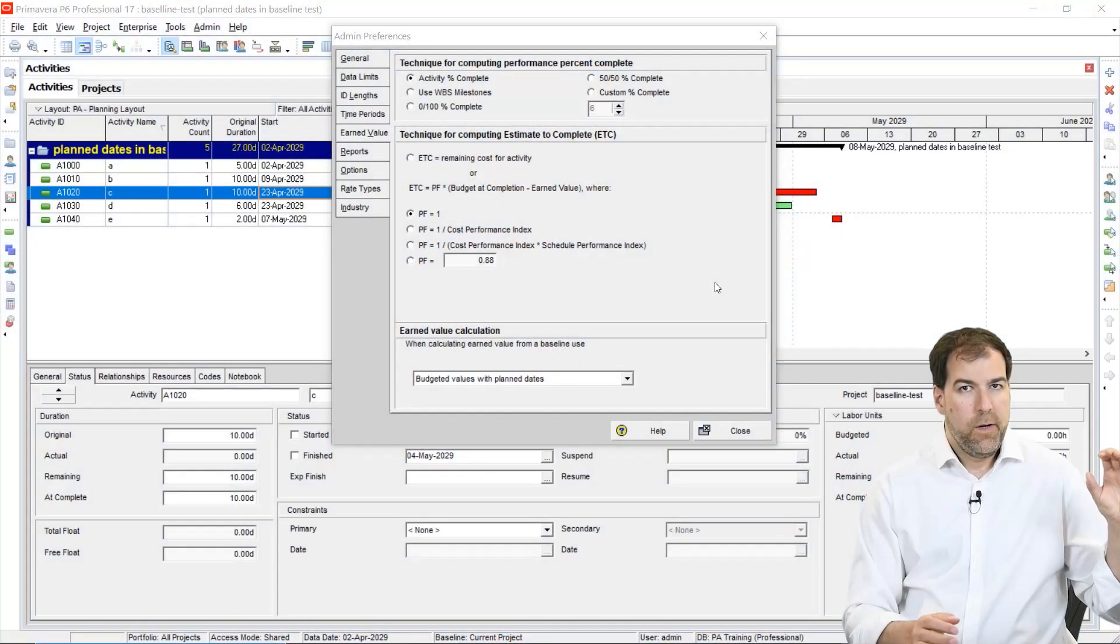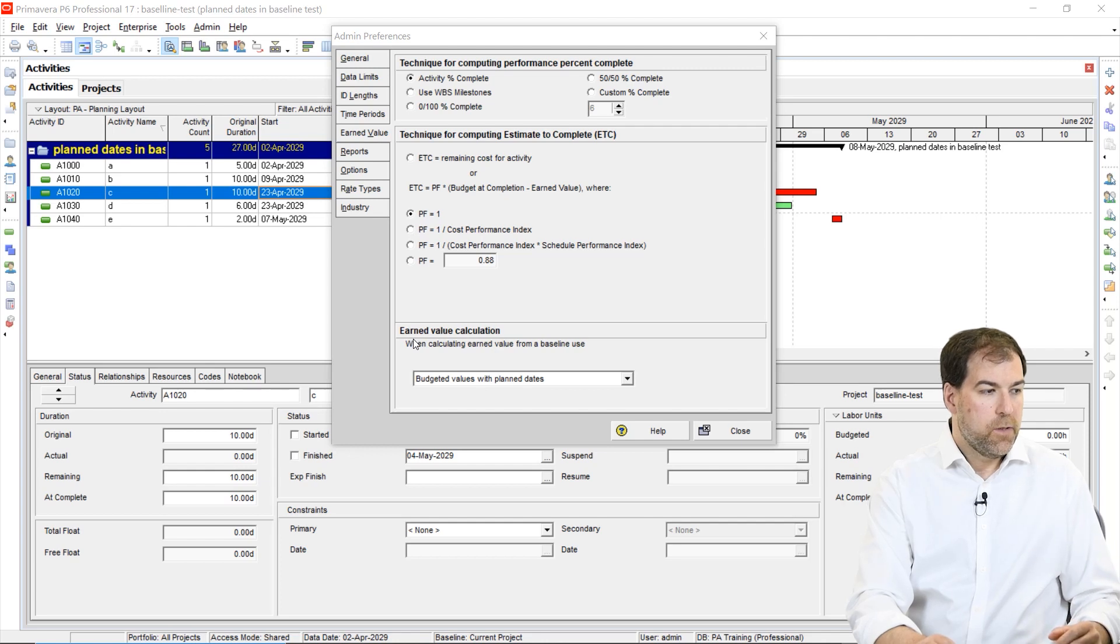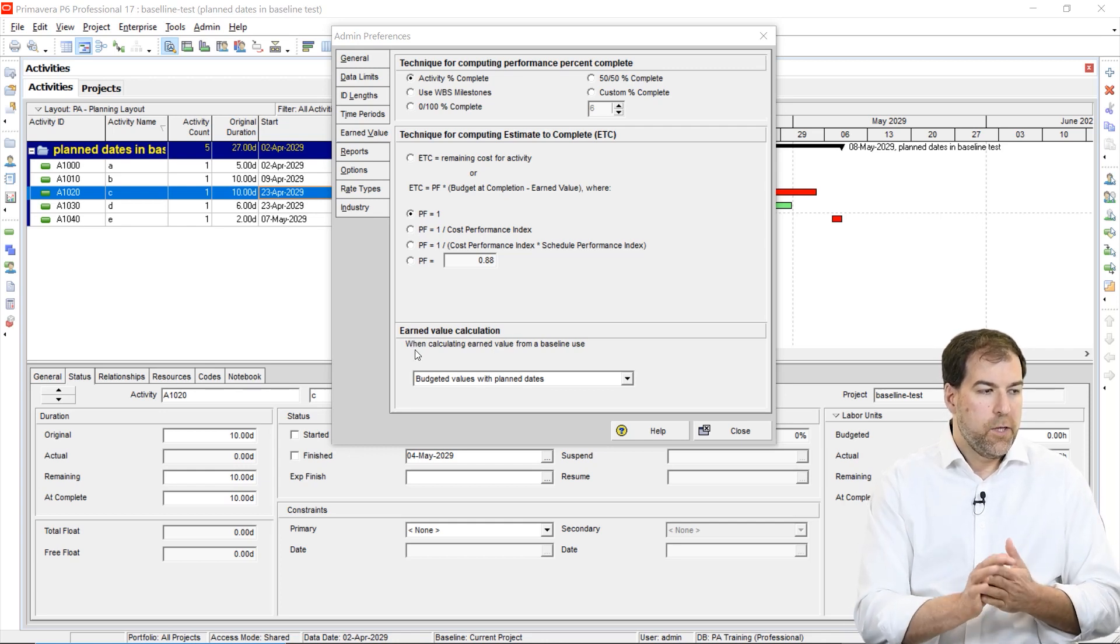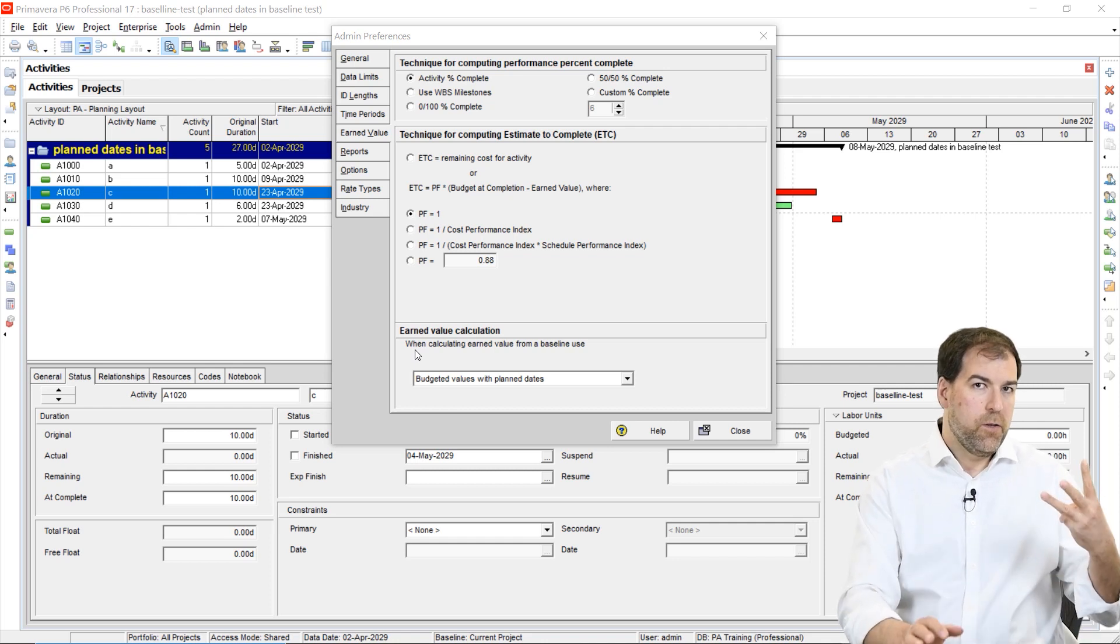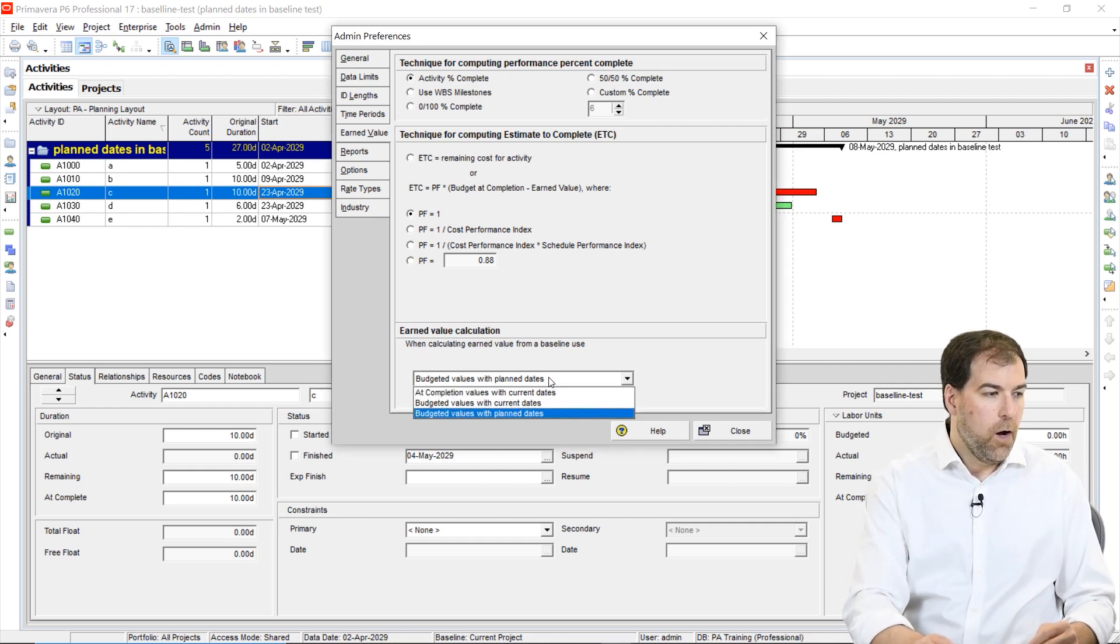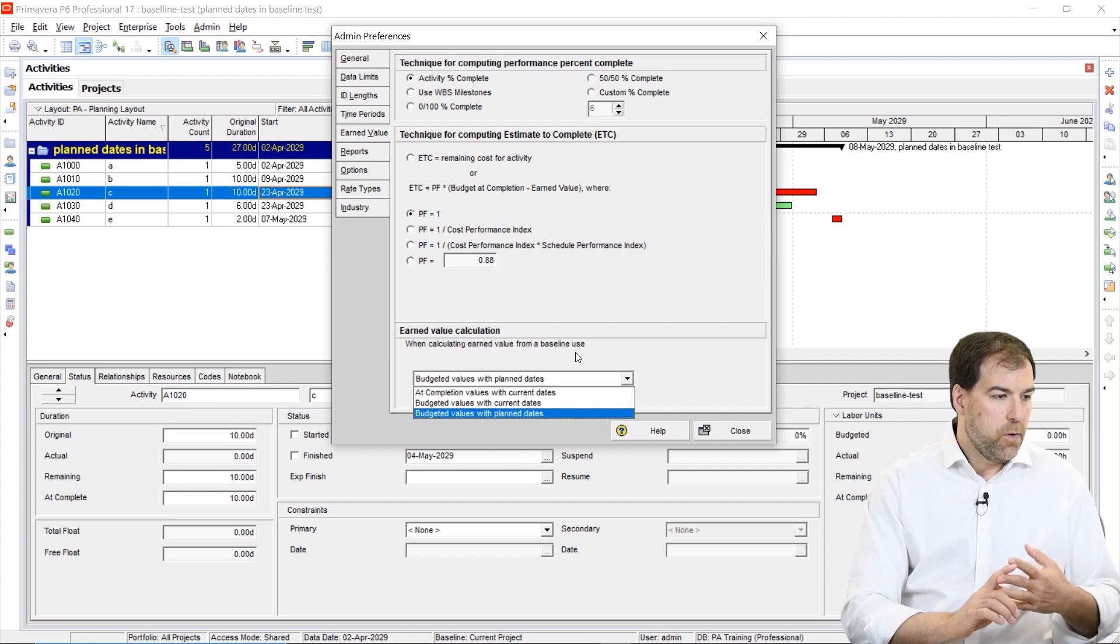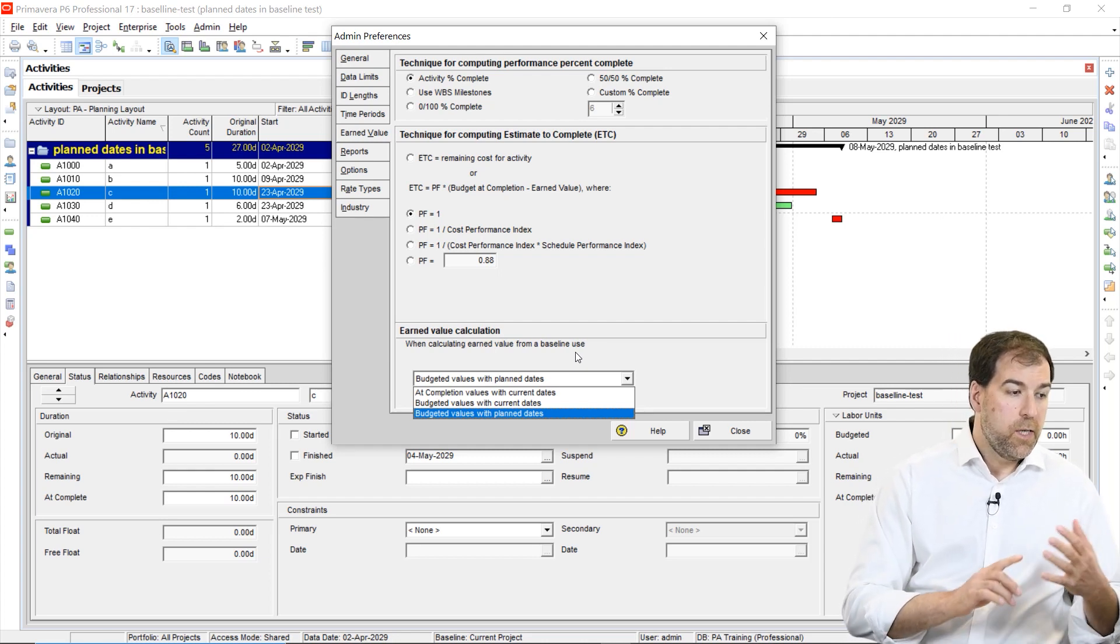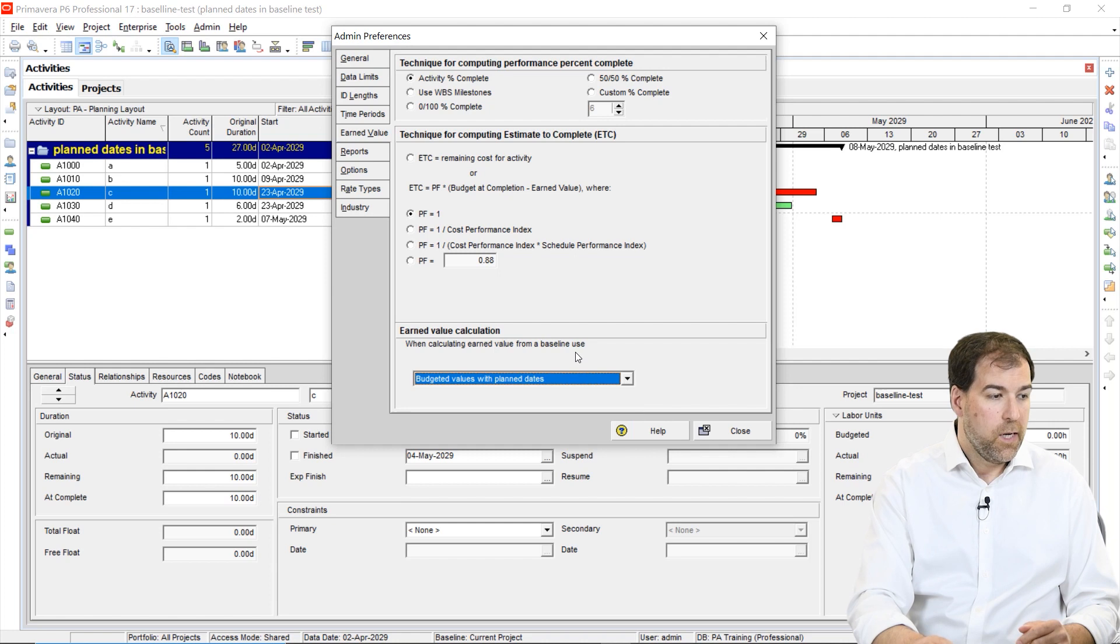On the admin preferences area under earned value settings, we have this field here, it says earned value calculation. When calculating earned value from a baseline use, and we get a drop down here with a bunch of options. Budgeted values with plan dates, budgeted values with current dates, at completion values with current dates.